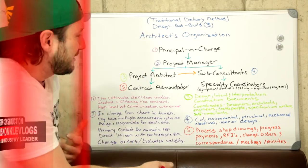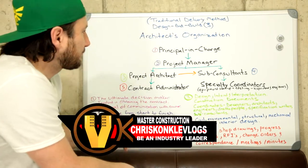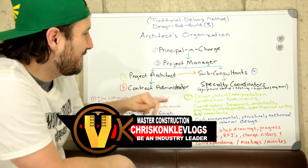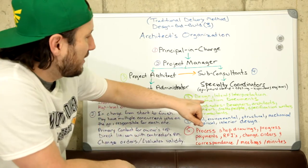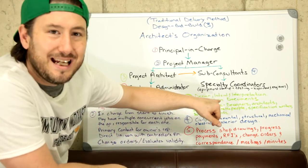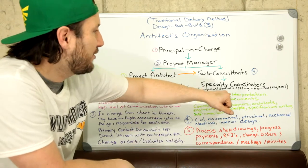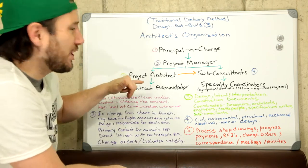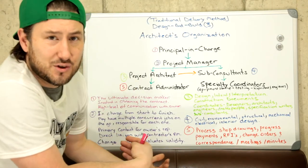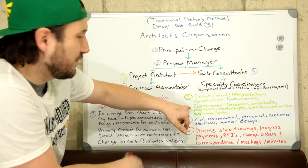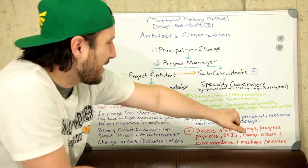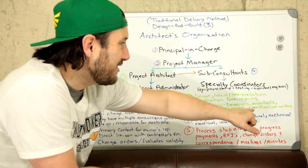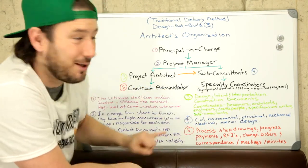For day-to-day change orders, the project manager will validate and approve or disapprove them, while the principal in charge handles major decisions. The project architect is the person in charge of the design and also explaining the intent and interpretation of the design. When RFIs come in, it's the project architect who gets those clarifications done.